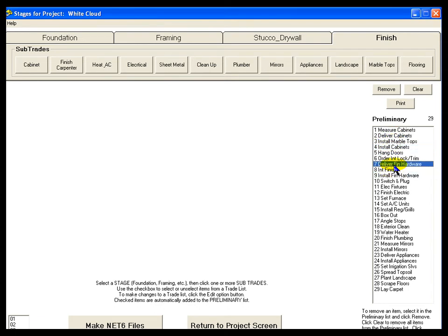This list will then be read into the network element of the DMS system, where all required attributes such as precedence, production rates, durations, sequence numbers, and lot or apartment numbers are added. A sequence list is developed as variations and specific location numbers are applied.